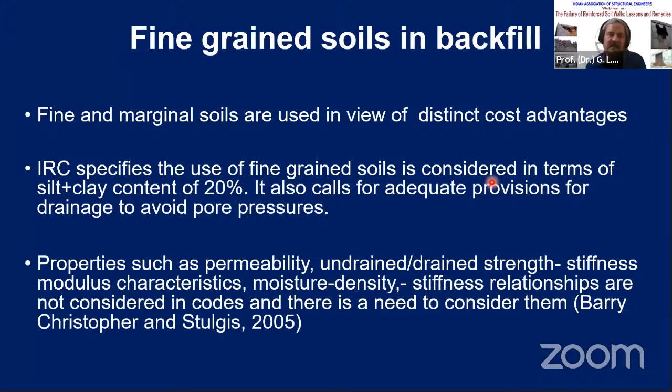So you have to pick up the value and mention it somewhere and say that, yeah, if you have this much of stiffness and this is a very good compaction, this is what it means. And if water also is there, this is what it means. So some sort of understanding should be there, nothing more than that, so that one can interpret. Like once you go to the site, if you look at the record, then you can say that, yeah, the soil is not well compacted. So that may not be the reason. You can eliminate some reasons. That's what I want to say.